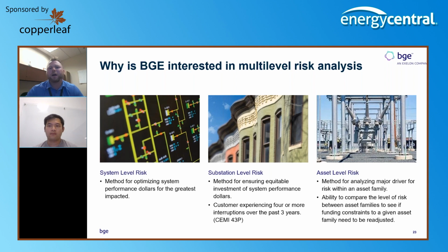system, or are we leaving pockets of customers in scenarios where, because of the consequence, the number of customers off of that particular station, they're not rising to the level of getting included in the plan. We could set some thresholds of, hey, here's the minimum level of risk that we want to have at a station. If anything exceeds this, we're going to start going in and targeting some projects in that spot because we want to drive it down.